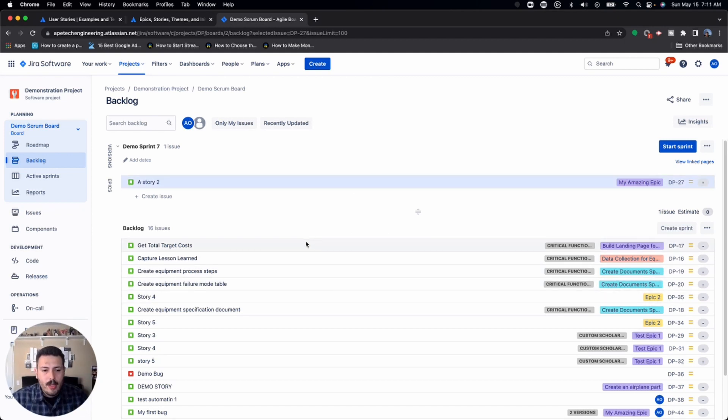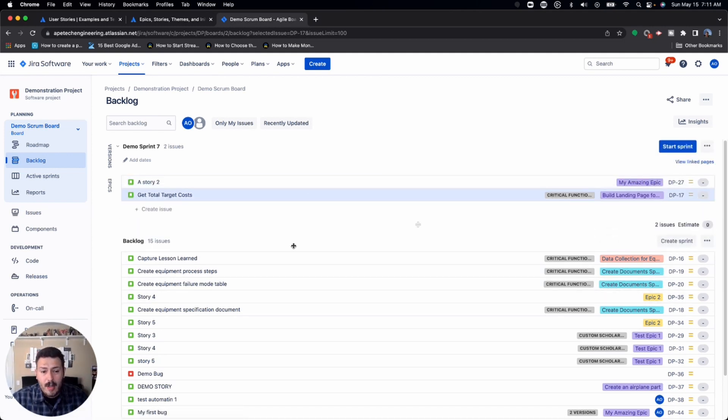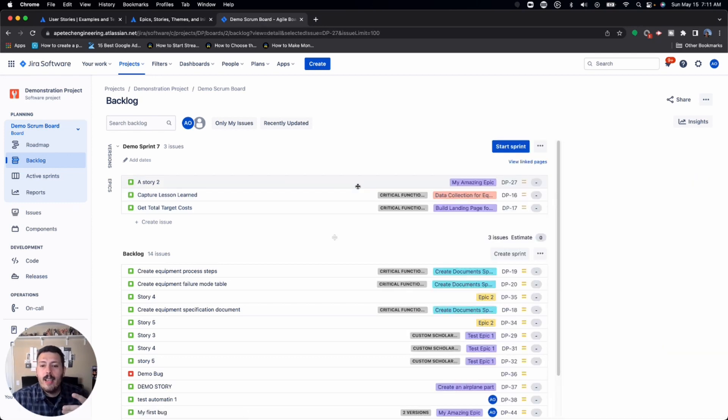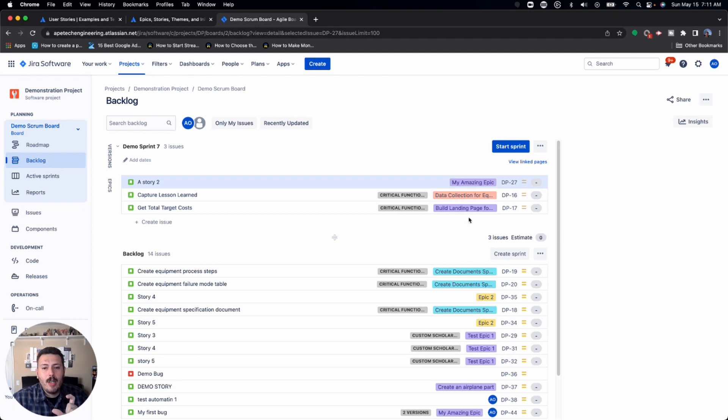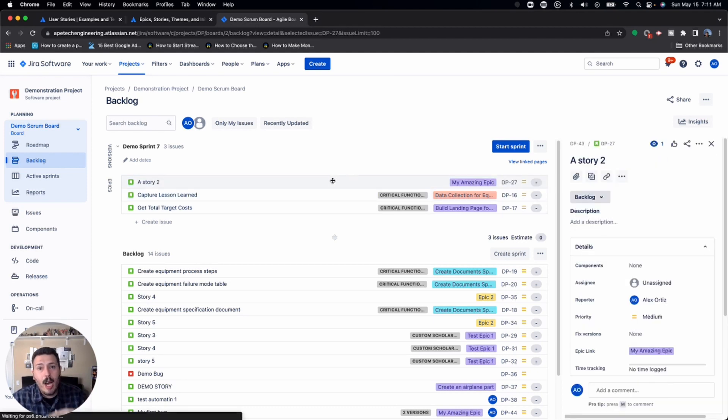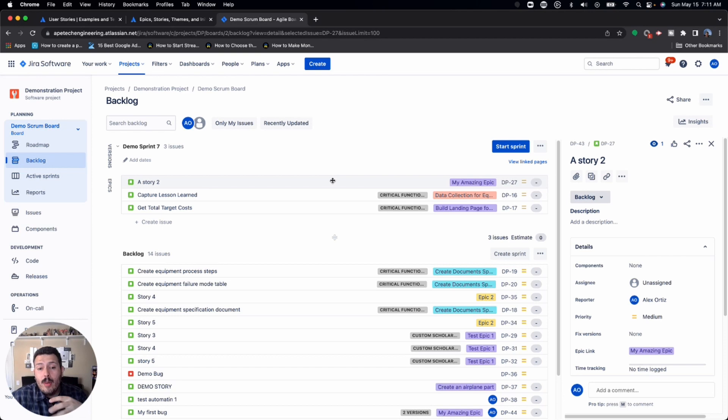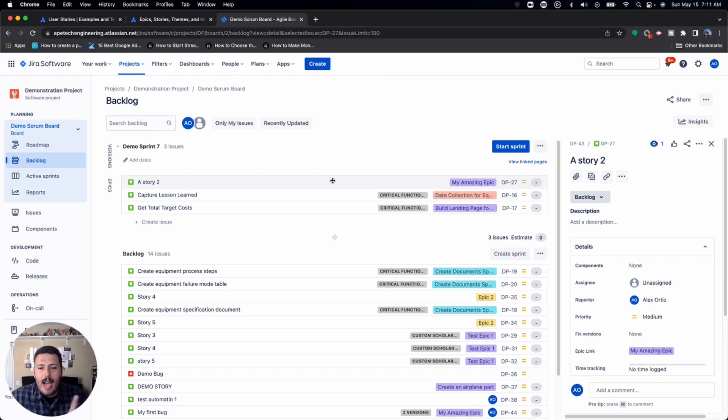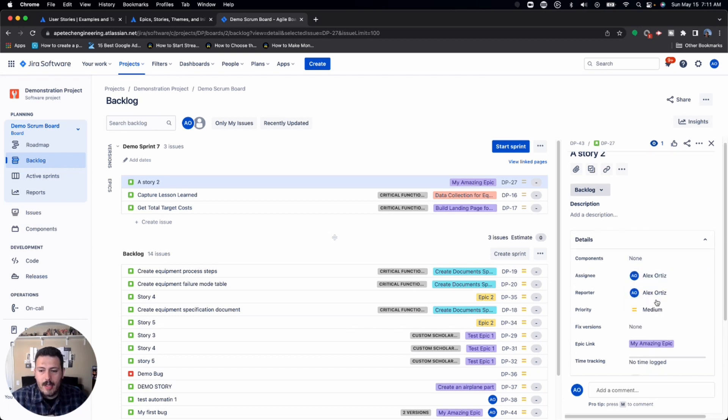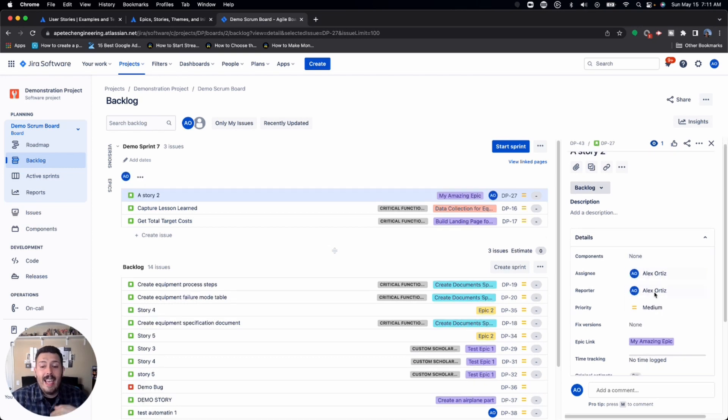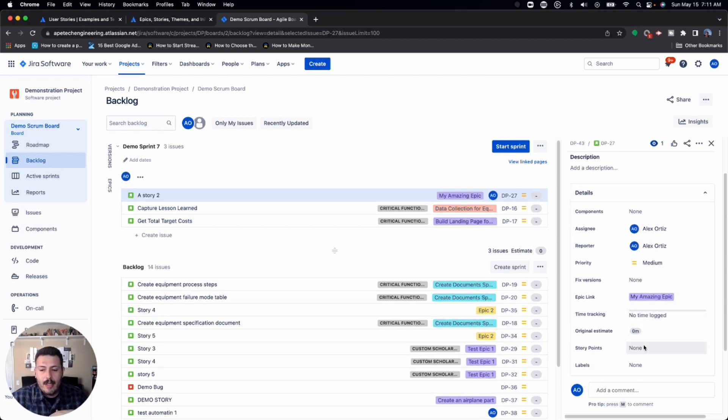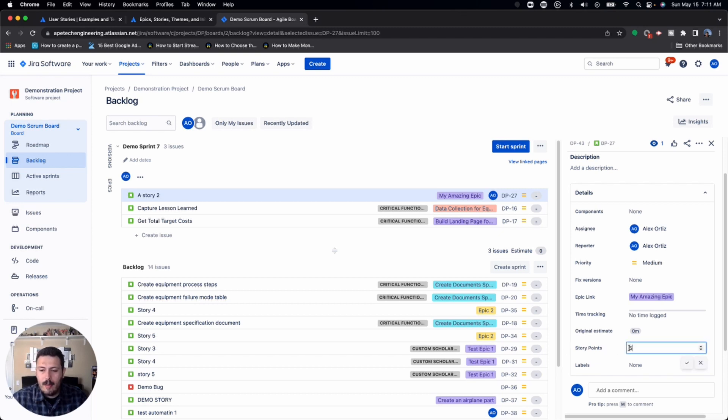Once it's in the sprints, I'm going to bring a couple of issues here. Once they're in the sprint, then assign the story points. Now this part's a little bit more controversial or optional, if you will. But when I'm in this kind of sprint planning mode, I will assign the issue to somebody. So I'm going to assign it to myself and I then estimate the issue. So I'll come down here to story points and give it a point.